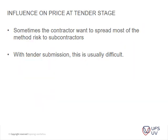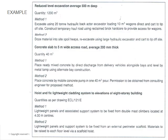The method statement has an influence on the tender price, plant selection, and materials. At tender stage, a contractor may want to spread most of his risk to subcontractors through the method statement. With tender submissions, this is usually difficult because subcontractors at tender stage don't usually give the main contractor a method statement, though a mechanical or electrical engineer might assist.